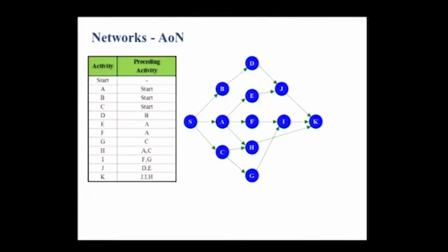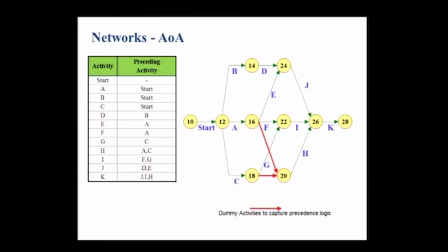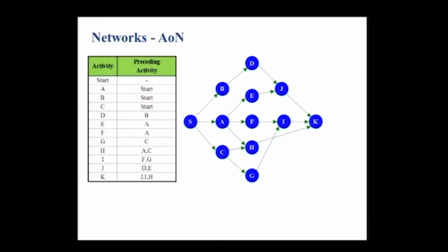Done? Much simpler, okay. The logic flows and you are able to go through the whole process. You might get a few arrows crossing which sometimes cannot be avoided, but basically your activities are on the nodes and arrows represent relationships. As you go through the network you start drawing your arrows, putting in your remaining nodes, and it flows through. Now this representation and this representation contain exactly the same information, same topology, okay. From a human perspective this is much easier to interpret, and we will continue with this for the hand analysis, okay.